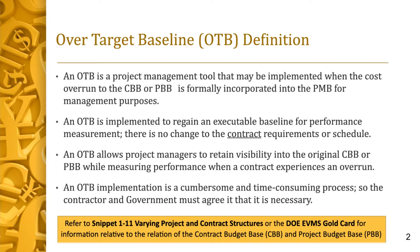At a minimum, reporting of ACWP must continue. Please refer to Snippet 111, Varying Project and Contract Structures, or the DOE EVMS Gold Card, for information relative to the relation of the Contract Budget Base (CBB) and Project Budget Base (PBB).